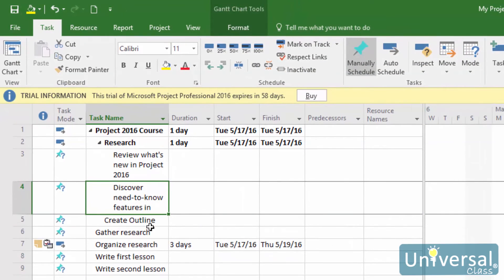Most projects will not go according to plan. That's not necessarily a bad thing, but when it happens, you need to know how to adjust your plan as well as the information you have recorded in Project. This may mean that you need to move some tasks around. If you need to move a task further up or lower down on your outline, use the click and drag method and follow these steps.